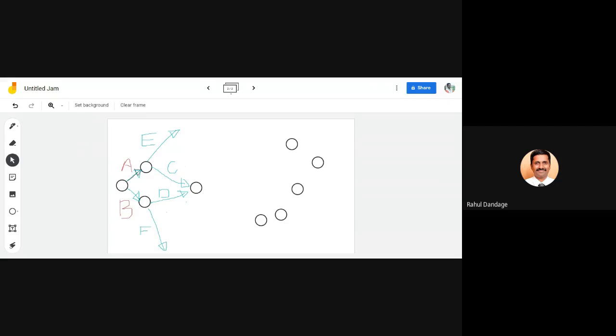From C and D, what activity do I have? It is G activity. So again, I am taking the pen. I can have G activity. Okay, understood? Why are C and D brought together? Because G depends on C and D. So we should club them in a single node, single event, and then start with G. Now, if you see the further part, what is H?